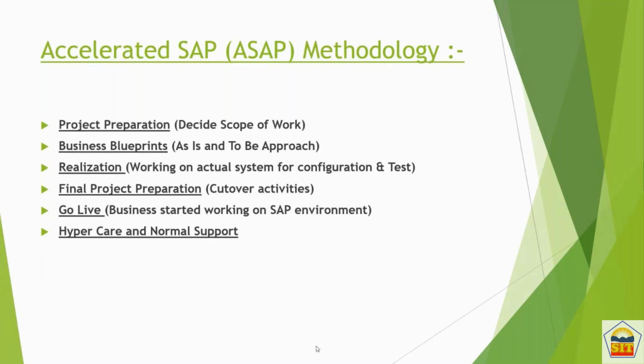Then once this realization is completed, we will go with the final preparation, where we'll be carrying out the cutover activities. What do we mean by cutover activities? We'll have the cutover data which we are going to manage, which we are going to move. Move from where? Move from the old ERP to the new ERP. The new ERP, obviously, is your SAP ERP.